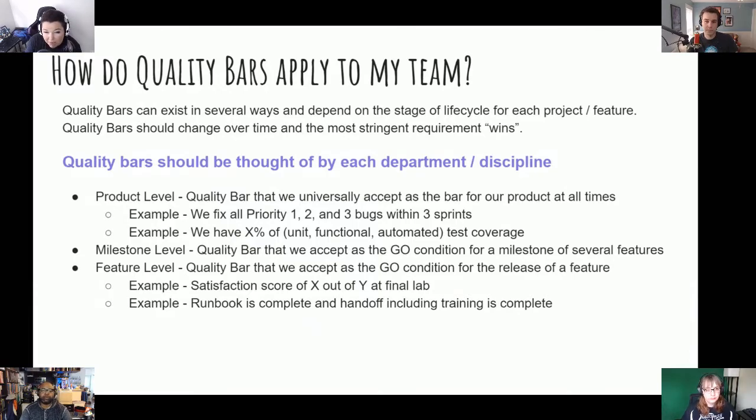Maybe earlier in our development process, before pre-production, when we're just in the find-the-fun phase of things, we may only fix priority 1 bugs. That's because priority 1 bugs will tend to be build breaking or prohibitive. You may call them blocker bugs, you may call them critical bugs, whatever you call them. Your top priority bug may be the only thing that you fix early in the project.